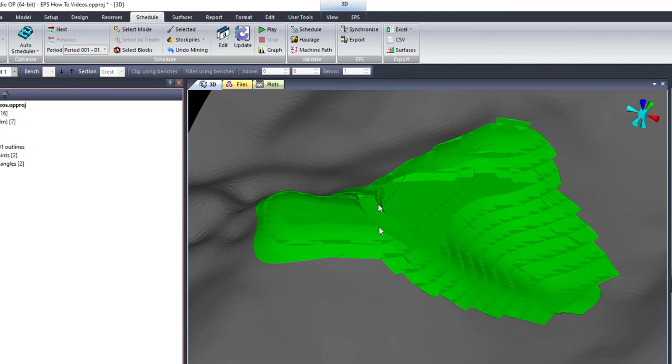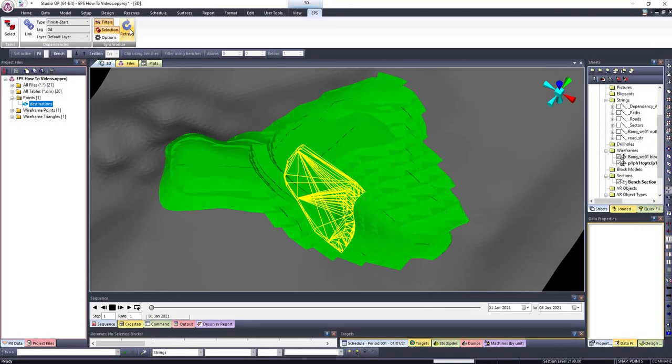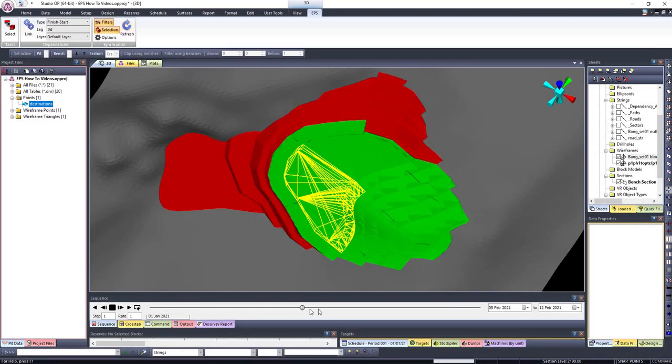If you now proceed to the EPS ribbon on Studio OP and click on Refresh, the two will be linked and you can visualize the data on Studio OP.